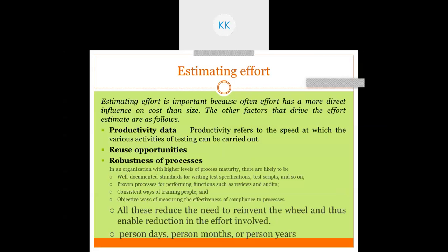But in practice, it is not so. Why? Because some of the test cases are independent and some are interdependent on other test cases. It may be that the whole set of test cases is interdependent on each other. In that case, you will require a total of 10 hours of work to execute those 100 test cases. If all the test cases are independent, you will require only 1 hour.